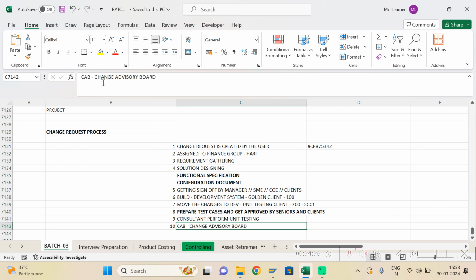whether unit testing is passed, all the documents are uploaded, all the test cases are passed, client sign off is received, and many other things. It depends company to company. They will check something called code impact analysis. Whatever code changes your developer has done, they will check the impact analysis. If it is not impactful, it should be in green.